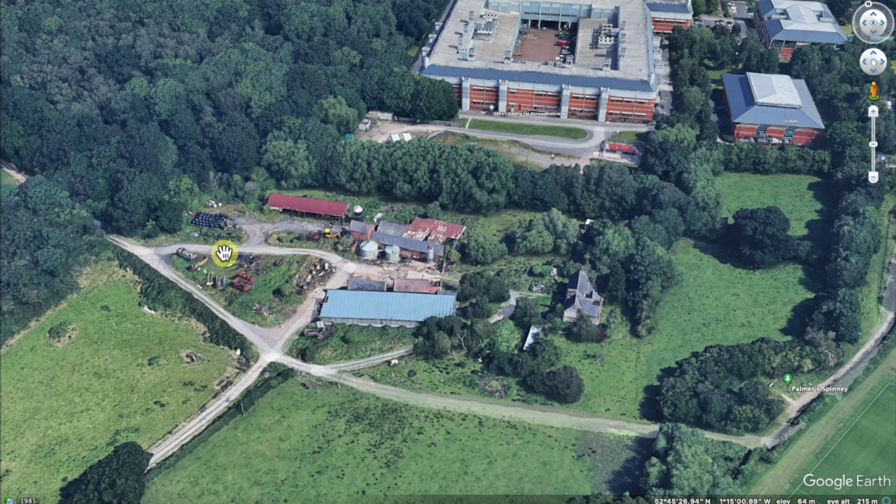So from Class D we've got site clearance, general clearance in hectares. We know now, we've got the size. We've got trees to clear, we've got tree stumps to clear, we've got buildings to clear, we've got other structures to clear, such as these things here, and we've probably got pipelines somewhere, probably down here somewhere. So this probably encapsulates most of what is in Class D, and it does give you a visual idea of the sorts of things that you would have to clear.